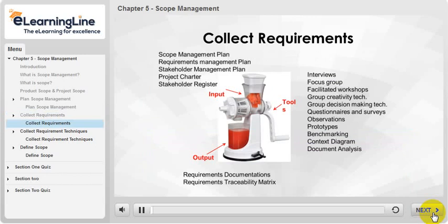Let's think for a while about what you need to collect all your requirements. We have the Charter, Scope Management Plan, and Requirement Management Plan in our hands that we created from earlier processes. To collect all our requirements, we need the Scope Management Plan, which will show how project teams will determine which type of requirements need to be collected for the project. The Requirement Management Plan provides processes that will be used throughout to define and document the stakeholder needs. The Project Charter will help us show a high-level description of the product, service, or result of the project, so that detailed requirements can be developed.